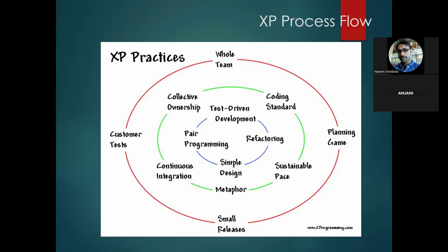S means a small story, which can have a story point of 1 or 2. M is medium size, which can be a user story of 3 points. Then we have L, which is a user story with story points 3 to 5. XL is a user story with story points of more than 5, and double XL is a user story with story points of 8. Eight is the maximum story points that can be considered in a 2 week sprint.